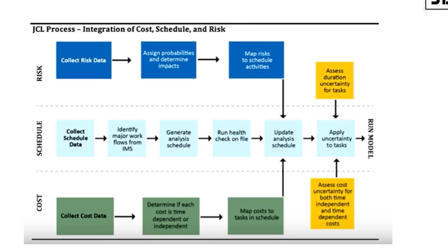We look at the risk register, we overlay that, and of course in the workshop, we then run the model and we get our results as far as the cost and schedule is concerned, our tornadoes. But most importantly, and this is where NASA was ending up, was to say we need to be confident at a 70% level of hitting both our cost and our schedule objectives. Now, typically in industry, we don't have that kind of money lying around. We also want to talk about capital efficiency. So we would typically approve a project at a P50 level. And if we're a little bit worried about the risk profile, or if the project owner is a bit risk averse, we would keep a management reserve, which again is also specified by the AACE at a portfolio level, a delta between the P50 and the P whatever they decide on.